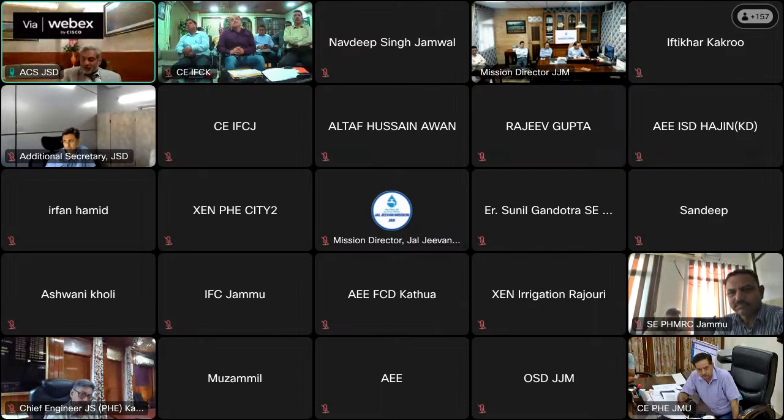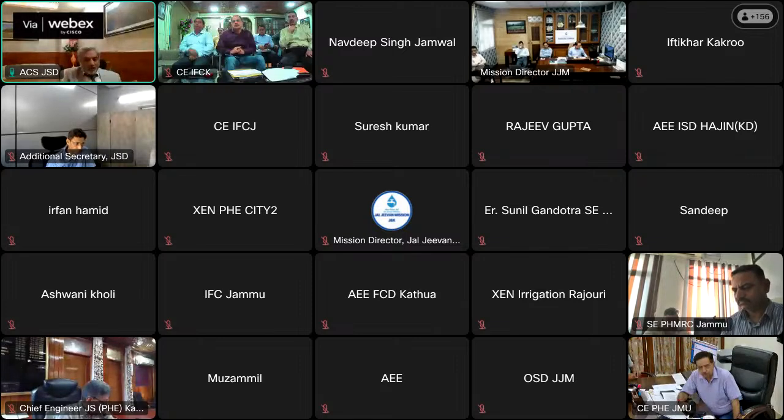So on this particular thing, there was an instruction issued somewhere in December, January, that these dead stocks will be segregated in two categories. Serviceable, which can be repaired and used, is a separate category. Those which cannot be used are a separate category. Those which cannot be used will be auctioned off by the committee, which is already in place. Those which can be made serviceable or are to be utilized are to be separately indicated. This exercise should be completed within the next 7 days. Every exchange would do this.